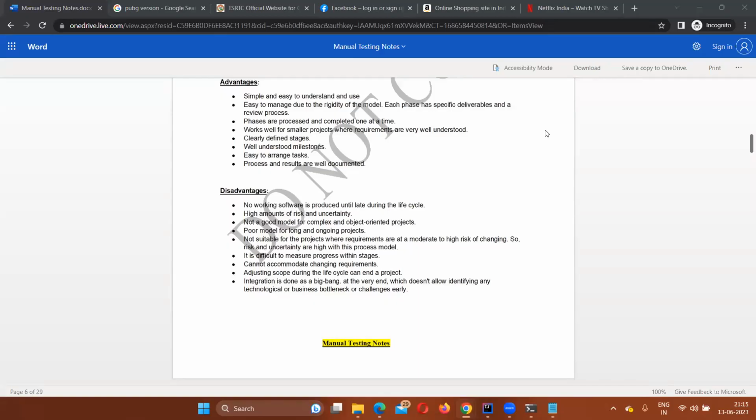You can never really say that the application is fully developed, but in whichever phase you take the application, let's say after phase 1 or phase 2 or phase 6, or after 5 iterations or 10 iterations, the application will still be functioning at any point in your incremental iterative model. After the end of any iteration, the application is usable, ready to use, it can be released. It's not like your waterfall model where the entire application should be ready, only then you are going to deploy or release the application. That's not the case with your incremental iterative model.